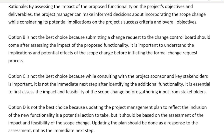I want to make this a learning moment and call your attention to the change request process that every project manager should be thinking about for this exam. The first thing you do when you get a change request is to ensure it is well documented. If the change request is not documented, it is your job as the project manager to ensure documentation. You make the change request template available, ensure it's filled, and then document that in the change log.